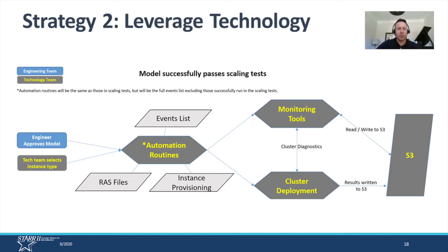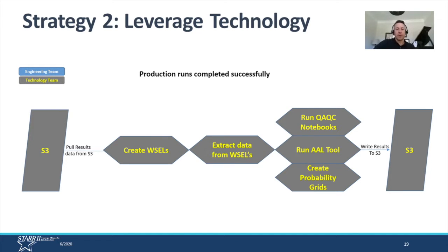And real quickly, again, some more models to throw at you. Not to belabor it, but the agile approach that we took was really a great model up front. Running these scale tests to get engineers to verify and actuaries to actually look at the data and say, you know, that looks about right, before we scaled the model and spent a lot of time and money to run all the probabilistic events. The agile approach was critical. And then finally, when everything was all set, the technology was set up, the scale tests were run, we just let it rip. And it ran thousands of iterations, delivering that standard output that we defined earlier, which was ultimately just probability grids.